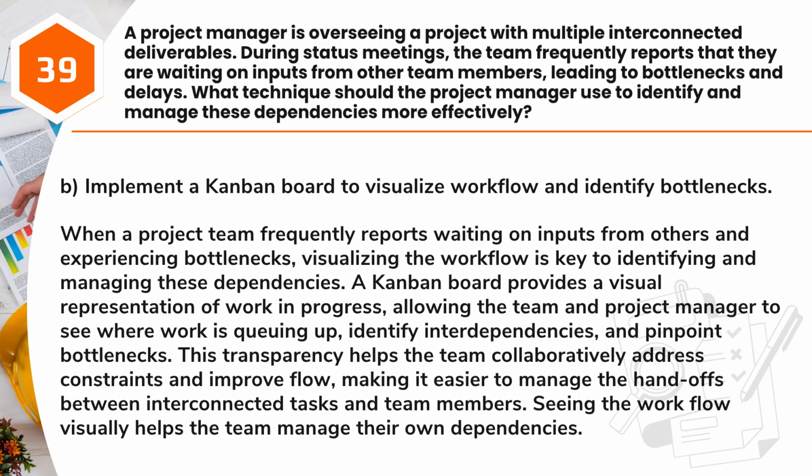A Kanban board provides a visual representation of work in progress, allowing the team and project manager to see where work is queuing up, identify interdependencies, and pinpoint bottlenecks. This transparency helps the team collaboratively address constraints and improve flow, making it easier to manage the handoffs between interconnected tasks and team members. Seeing the workflow visually helps the team manage their own dependencies.